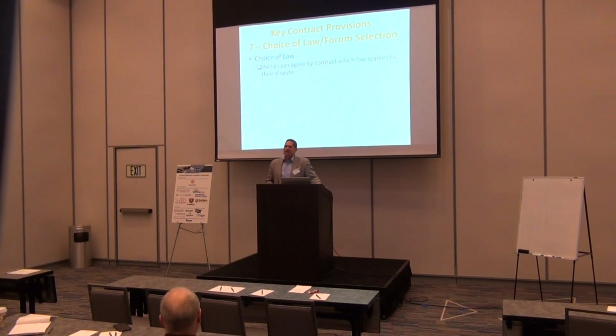Now, if they change the schedule from being 365 days to 270 days and don't want to pay you for that, the court's probably not going to make you abide by that. But that's where you're going to have the choice of, well, do I accelerate and submit a claim? That's one option. Or am I going to be late and defend?